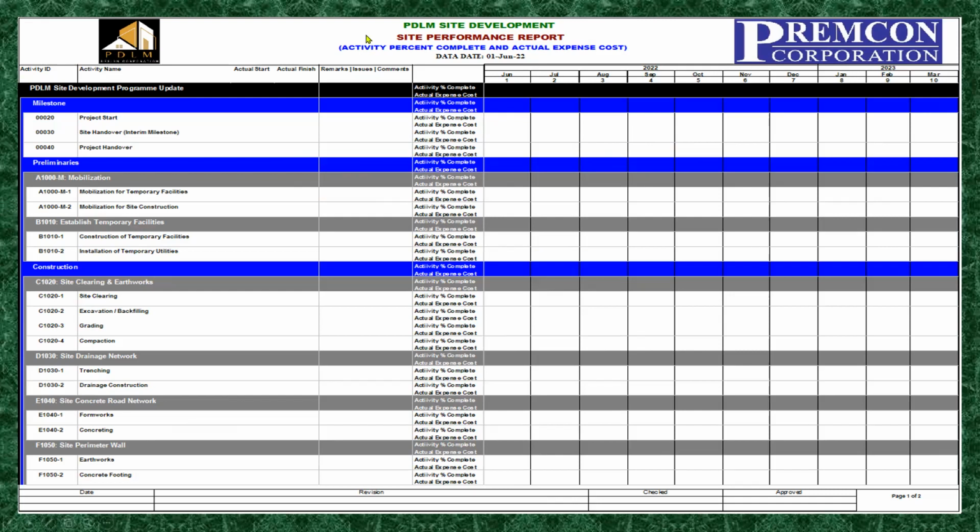So here in the remarks, issues, and comments, the personnel in charge will have to put some notes if they have some comments or remarks or issues. Let's say, for example, if there are some occurrences of delay events within that month, they should have reported it here.